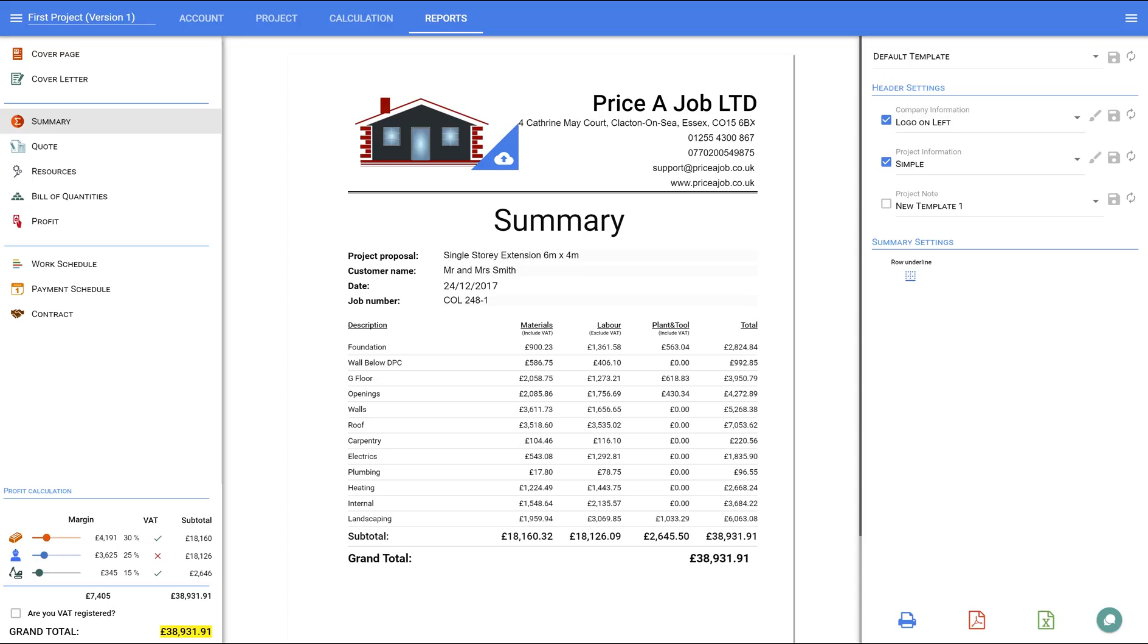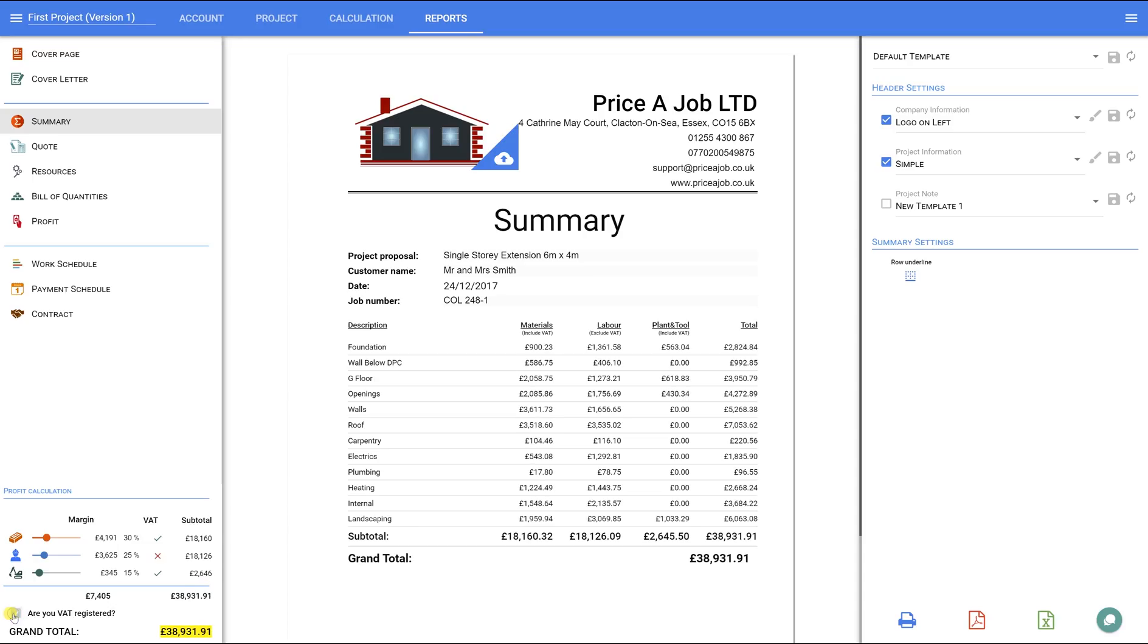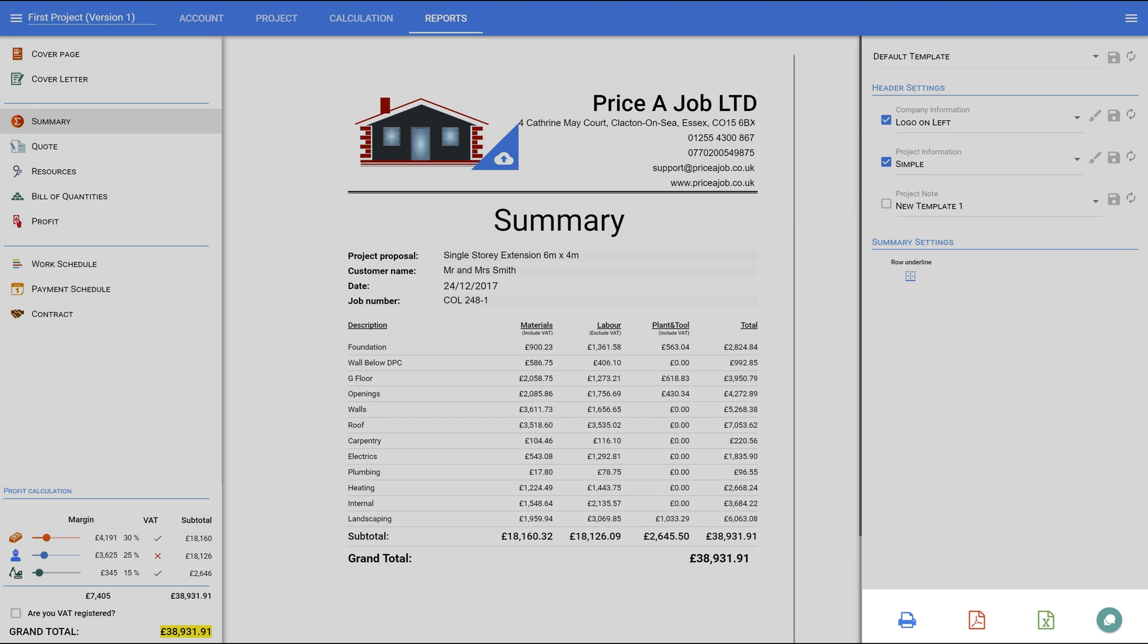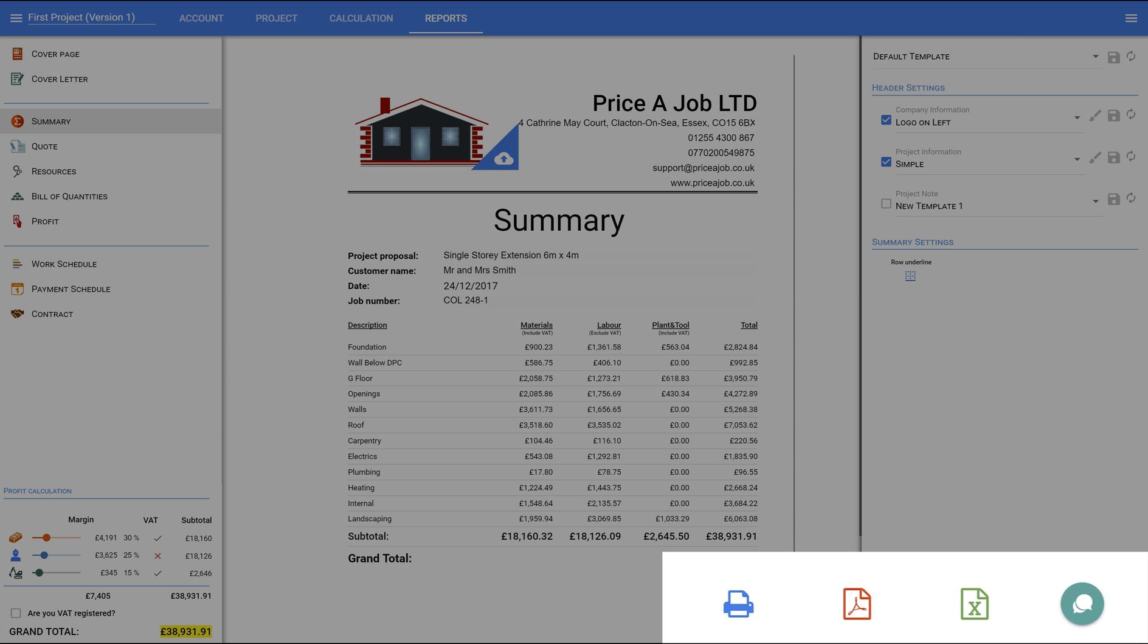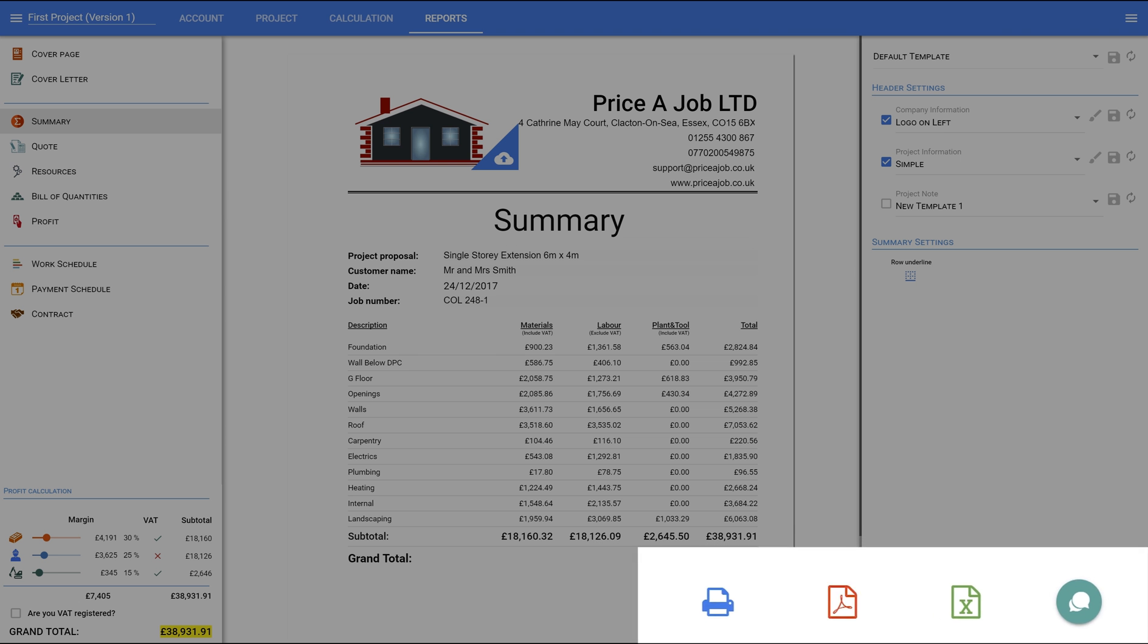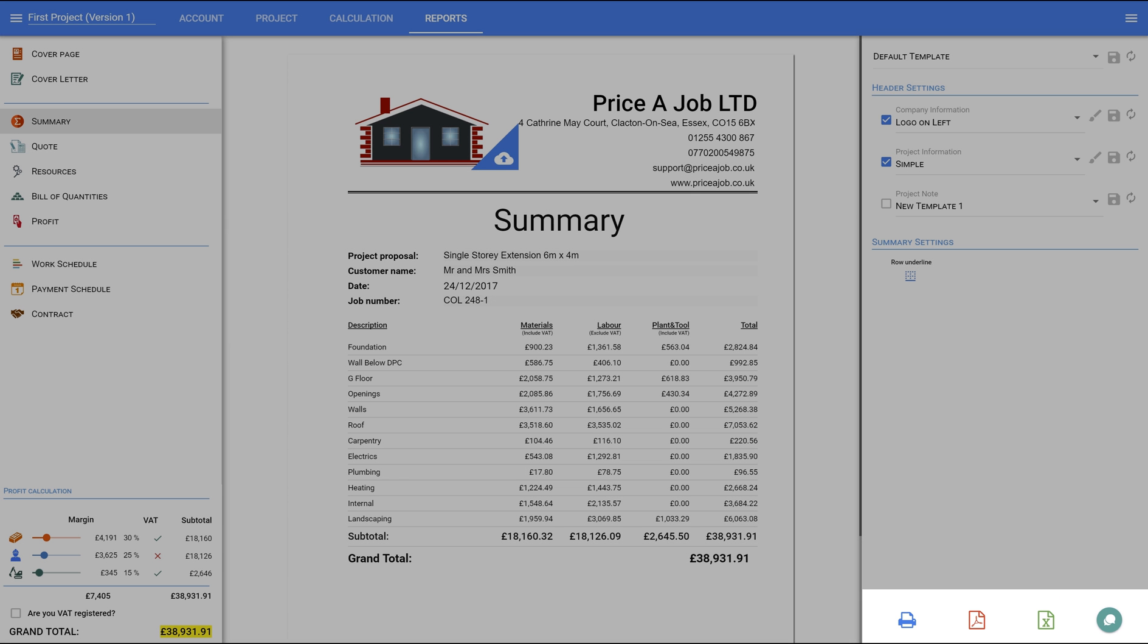As I am not VAT registered for this example, the VAT value will automatically be added to materials and plant only, as even if you are not VAT registered, you will still pay VAT when you purchase materials or hire plant. As you will have already noticed, you can print each page directly, or save it as a PDF, Word, or Excel document.